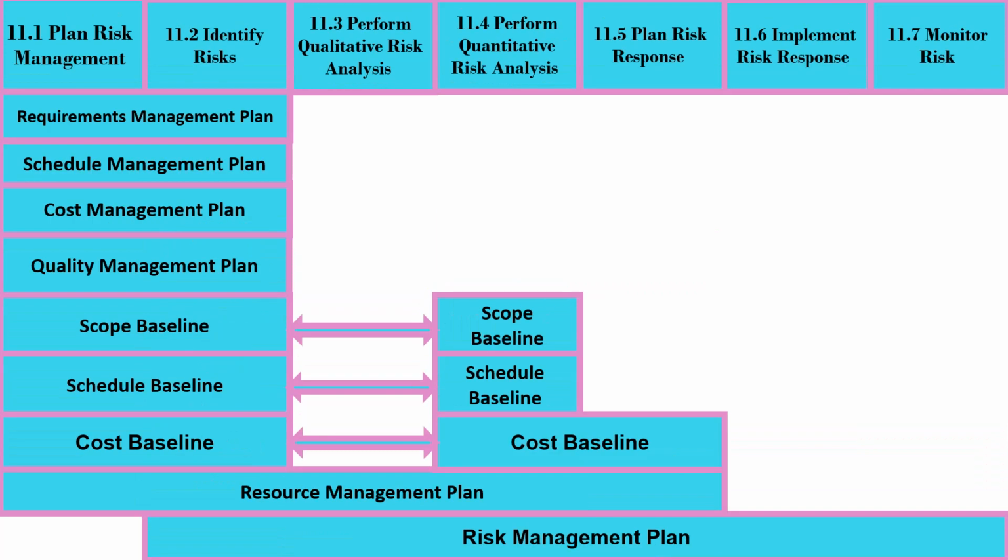We mentioned in the last slide that project management plan is input to all processes. Let us discuss them one by one. Both plan risk management and identify risks share requirements management plan, schedule management plan, cost management plan, quality management plan, scope baseline, schedule baseline, and cost baseline.